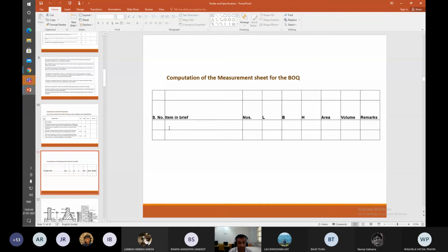Please understand, for every area that you dig, you will have to give the length, the breadth, and the height, and the quantity of mud will be calculated in cubic meters. All excavation material will be calculated in cubic meters. You know why I am doing this? Because right up to the plinth, you have to submit the quantification on the 11th of August. That's why I have started with your bill of quantity.